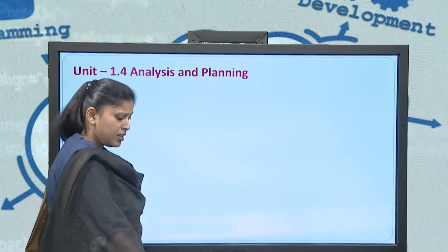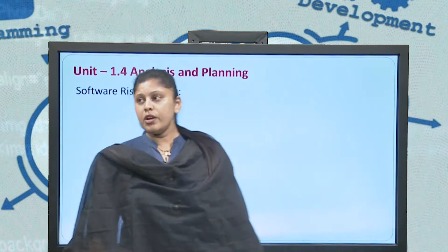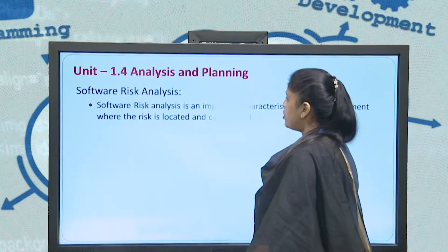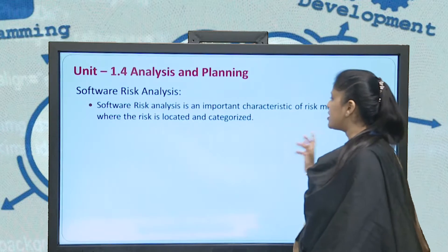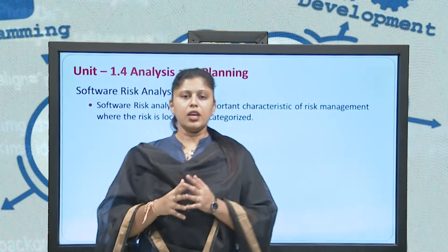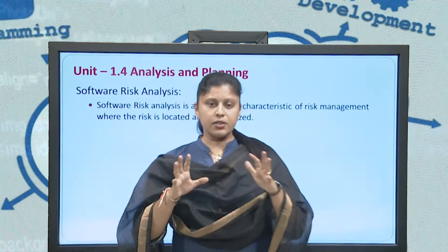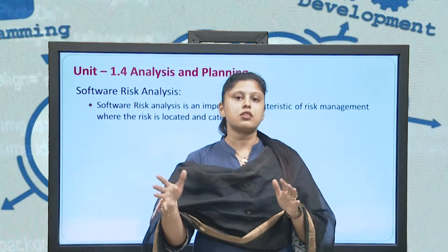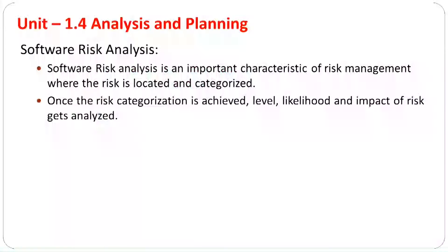Next, let us see what analysis and planning are. For software risk analysis, it is a very important characteristic of risk management where the risk is located and categorized. First, we locate the risk and characterize what kind of risk it is. Once risk categorization is achieved, the level, likelihood, and impact of the risk get analyzed.